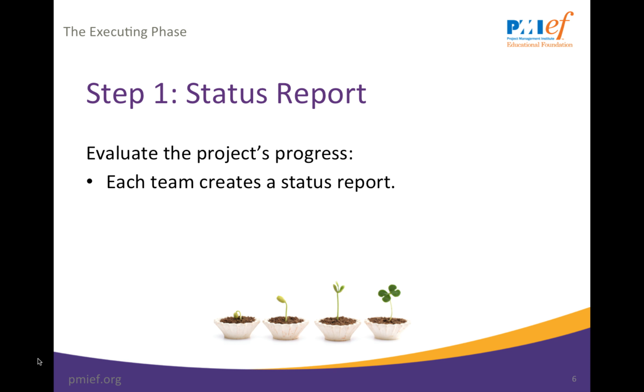Your report status should list some of the following types of information: the time frame of the report, activities, tasks, and milestones that were scheduled to occur in this time period, anything incomplete from the last report time frame, anything else that occurred in this time period, even if not scheduled. That includes things that were scheduled in previous time frames that are not yet completed.